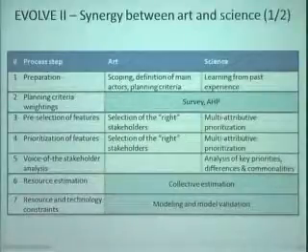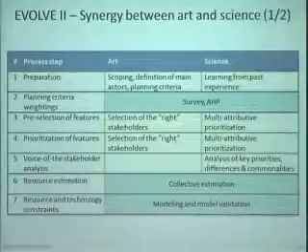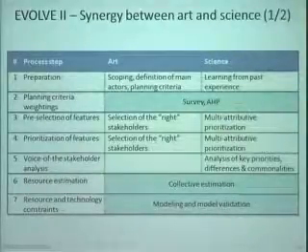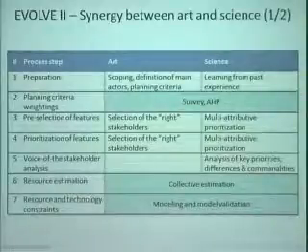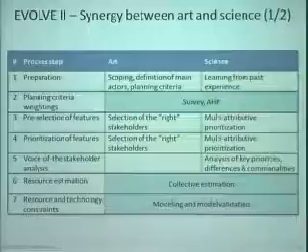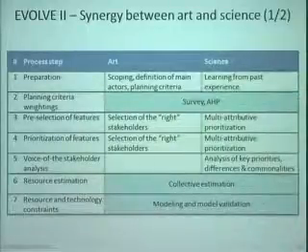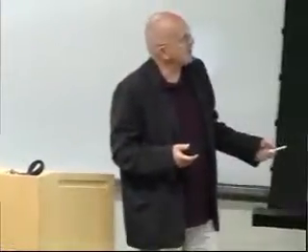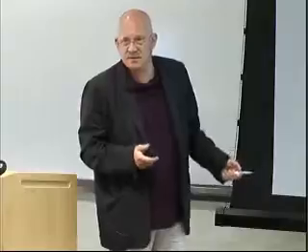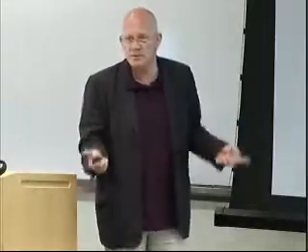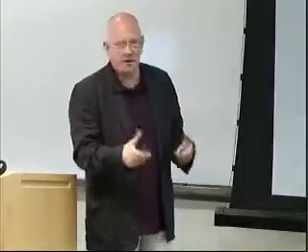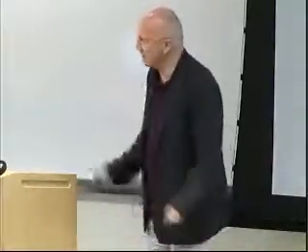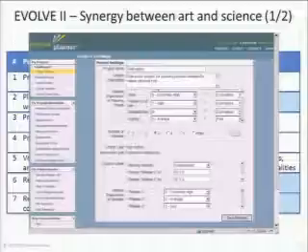It's hard to make a rational, objective, 100% certain choice. Who are your right stakeholders? You have a certain understanding about that, and that's certainly something which can be called art. On the other side, in science, you can, of course, do something called multi-attributive prioritization, which asks then for some scores about the importance. And in the same way, resource estimation can be done based on expert judgment, but you can, of course, apply this in a more rigorous way by bringing different experts together and trying to establish a process where they can collectively estimate certain things.